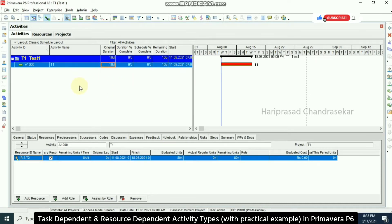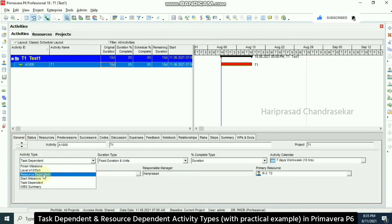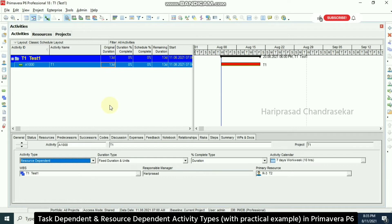Now I'm changing this to resource dependent. Resource dependent activity depends on the resource calendar. We can see how it's changing — from 10 days to 13 days. This is the difference between task dependent and resource dependent.